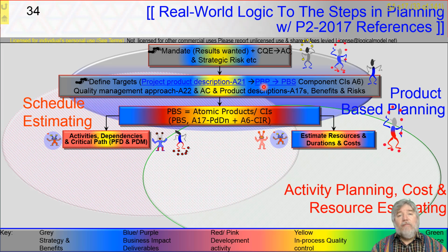where there is a hard logical requirement for a sequence of tasks. For example, you can't hang the engine on the wing of an aeroplane if you haven't built the wings. You can't put the roof on a house if you haven't built the walls, and you wouldn't want to do the foundations if you didn't have planning permission.